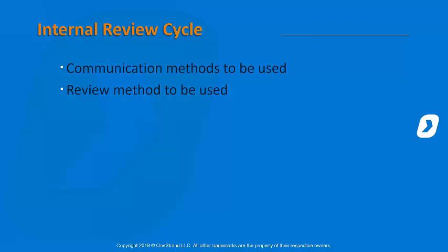Okay, and at some point in time, all of those chapters and sections will all get bundled up into a publication. Doesn't matter if it's an IETP or a PDF for this, but it's a publication. And at that stage, that publication gets issued to QA. The authors jump onto another project. Yep. QA might take 3-4 months to QA that publication.